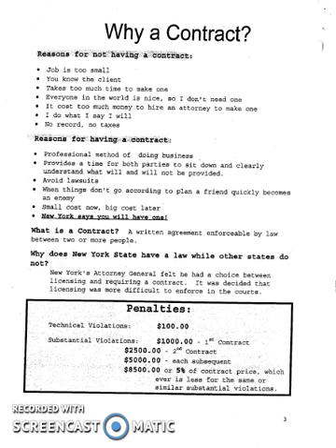And the penalties are relatively steep for this as well. For technical violations, it's $100, so a simple violation is $100. But when you step up to a substantial violation with your contracts or not having a contract, that increases to $1,000. The next time is $2,500, and then after that it's $5,000 for each subsequent violation, all the way up to $8,500 or 5% of the contract price. So the big moral of the story here is New York State wants you to learn from your mistakes when you have an issue with a contract.